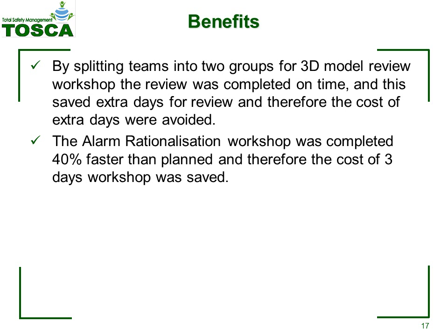Some of the benefits of the new HFE approach in terms of alarm rationalization example and 3D model review example are shown here. The avoidance of delays and extra workshop days and respecting the deadlines is the main benefit derived from the new approach to 3D model review. Each day of 3D model review has a minimum cost of €3,000.